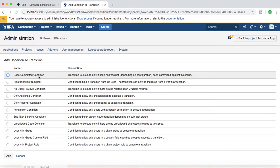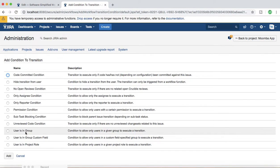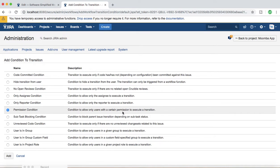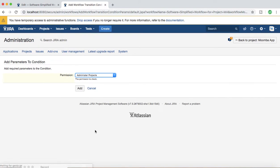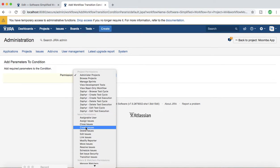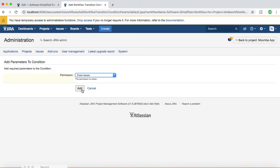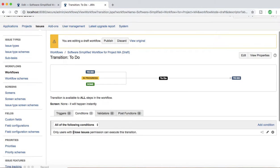If you click Add Condition, you can see all the conditions available — for example, code committed condition, hide transition from user, user in this group, or permission condition. If you choose the permission condition, it allows only users with a certain permission to execute a transition. Select it, click Add, and then specify the permission — for example, if a user has the Close Issues permission, only then allow them to transition the issue from To Do to any other state.